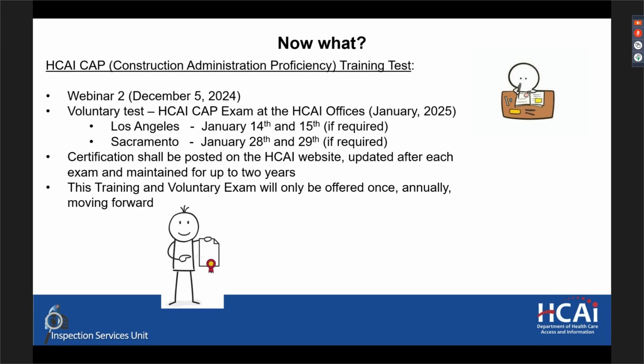And if you're managing everything through a document control system like Bluebeam or Procore, the same thing could happen. You could take the concurred NMA in a digital format and put it on top of the previously approved sheet. But both versions of the drawings should be there: the 30 by 42 sheet with the DPOR stamp, as well as the concurred NMA which alters that plan. Right, because they are all part of the approved construction document set.